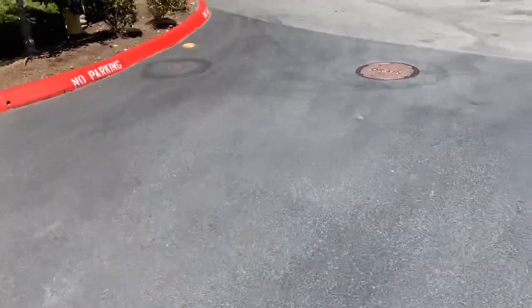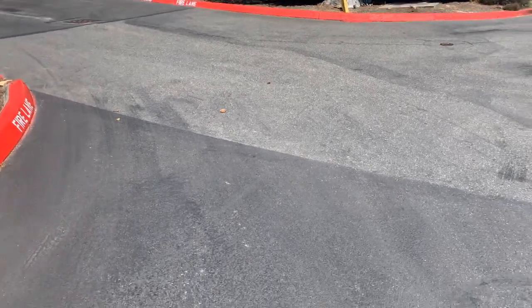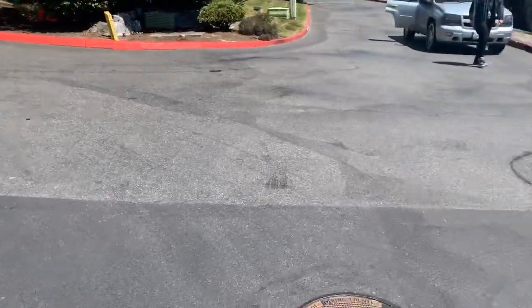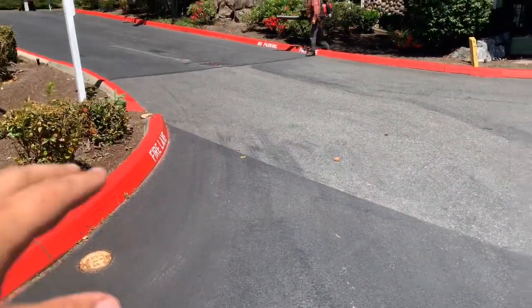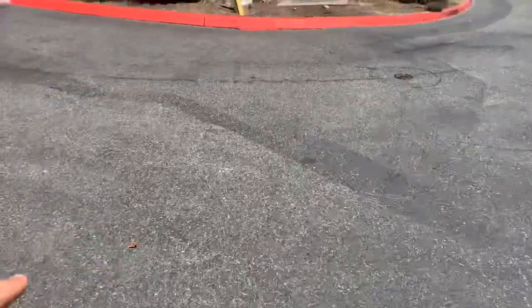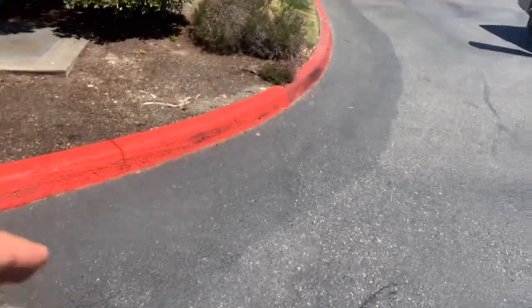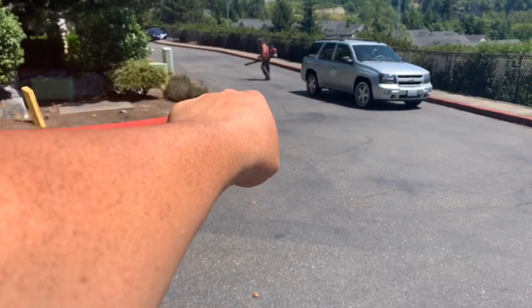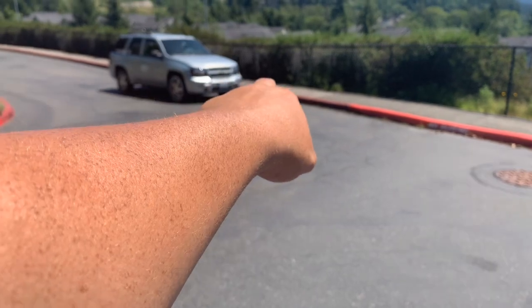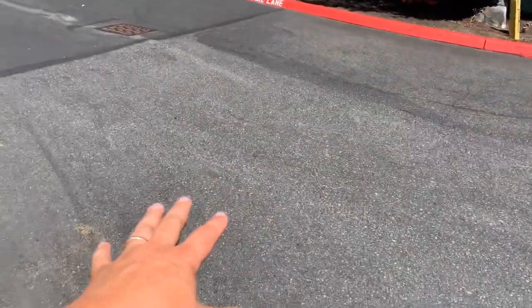Currently on the change order, I've got some additional asphalt that's already been approved. By the way, the change order was already approved and signed, but I'm going to have to get it re-signed because I'm doing some different things here. All right, so this area right here is seal coat, and it's on the original change order, still the same. On here there's the red line that comes down and stops right here, and it has like an imaginary line that goes across the road. Where that line is, right in front of that car, there's an expansion joint. That's where we'll stop the seal coating. Okay, that's still going to stay on the change order.